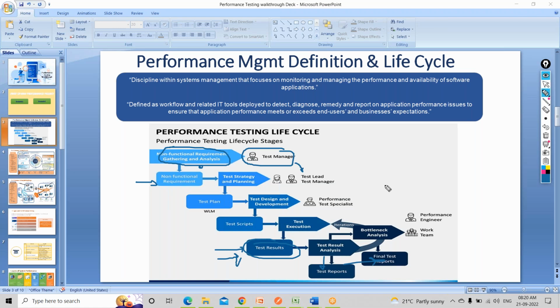In most companies, there is a plan: every day you have to send a report, and every week you have to send a report. There is a planned graph. In the test plan you defined everything in detail, right? Let's say by this time you should have the environment, by this time you should be able to access everything, by this time a license should be there. Different teams are involved: for this you need DevOps, and for billing and licenses the billing team comes into the picture. If the delay is happening from their end, things will get escalated, and the actual progress graph is going in parallel. This is how these things come under project management.